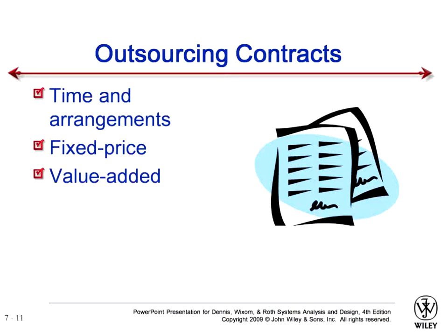Like what are the things which will be done to make the project complete. So in that case you have to make a time and arrangement contract. Another type of contract you make with outsourcers is fixed price, because you've set the fixed price, so this is the price I'm going to pay. So now in this price they have to develop a system which will be meeting their requirements.